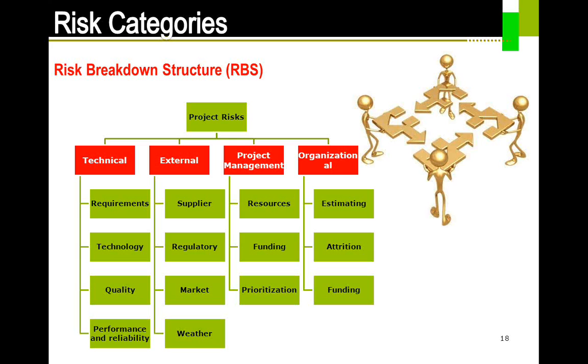To give an example, when it comes to technical risks, take requirements. I don't necessarily mean business requirements, but technical requirements. Somebody says that the web page has to come up within 1 second. Then we can say there is a probability that if the number of users is more than 500, the website will take more than 1 second. So that is the risk. I'm not going to go through all the things, but this gives you a very high-level view of how risk management can happen.